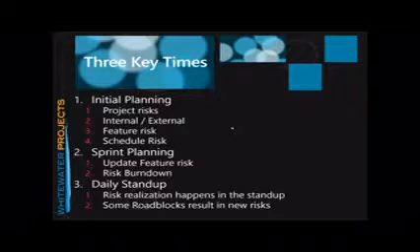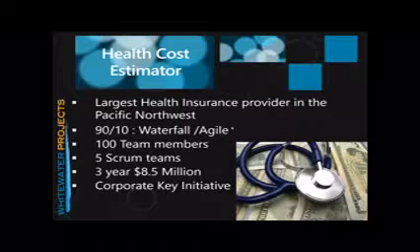A million. But as a project leader, you need to be looking at that and going, whoa, whoa, whoa. You worked on this for 6 hours yesterday. You were totally stuck, and you're going to work on it for another 6 hours today. Why is that not a risk? Well, sounds like you need some help. Do you? Let's talk about this. Don't let that just pass by. But too often it turns into a rote, routine meeting, and it just goes by. So pay attention. Look for those roadblocks. Pay attention to what people are saying and what they're not saying. All right, read between the lines a little bit. You can find those risks that are popping up as you go.